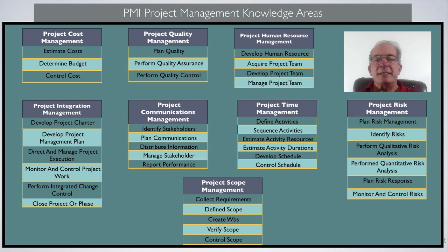I can't tell you how many times I've had risk management meetings where we sit down with the team to develop the risks and what we're going to do about them. And I get the deer in the headlights look that says, we don't know what you're talking about. When that happens, the project manager is forced to come up with all the risks and all the mitigation steps. The project manager must then get the team's buy-in and present this to management. What takes place later, when things don't go as planned, the team pushes back and says they didn't really come up with that risk.